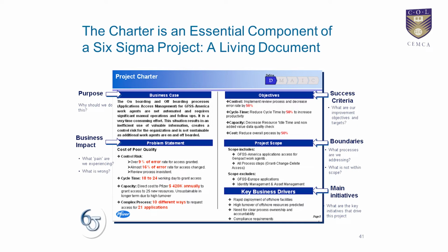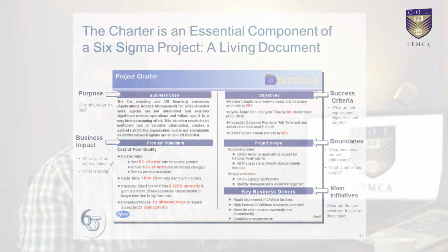Now, that's a very important thing to understand. Our project charter in a continuous improvement project is a living document. It is ever evolving. A lot of people might argue that a project charter does not change. Yes, it does not change when it caters to a project where everything has been fixed from day one. Now here is what happens in a Six Sigma project: when we are collecting and analyzing data, we might realize the data suggests that we need to gather more data. The scope of the process is very small. We need to enhance it. And when we enhance the scope of the project, the scope definition changes in our charter.